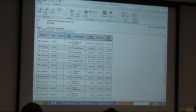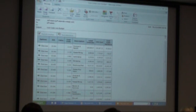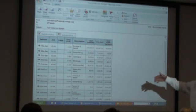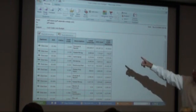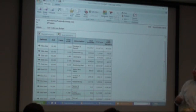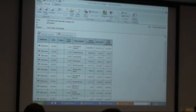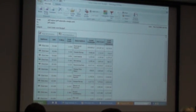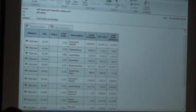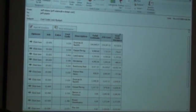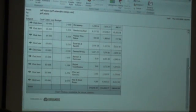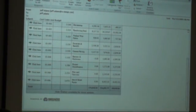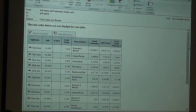Relatively simple. Now notice here, I'm gonna take this one, tear it apart a little bit. When you build these alerts, you get to specify the conditions: cost codes over budget if you look at them all, total estimate is less than job-to-date cost in all these cases. So that's the business alert condition you're looking for. And then you can do math, and then down at the bottom you can include totals. So there's a variety of things you can do, and it might be cost over budget.